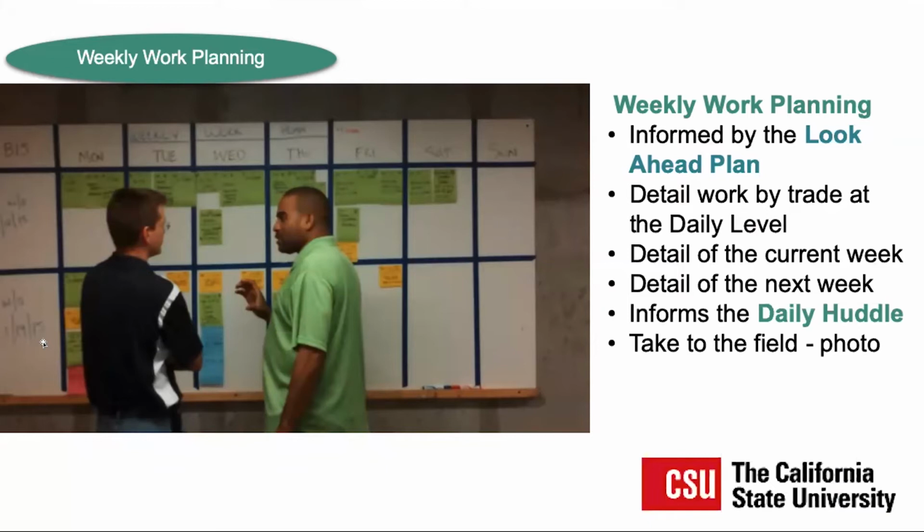Well, capture the metrics from the past week on your performance. How many commitments did you meet? And what commitments did you miss, and the reasons why? Not getting into a lot of detail on the why in an accusatory sense, but really just trying to capture data so you can look for trends. Then, what's our plan for next week? And really lock that down. That's how we're going to measure the reliability and predictability of our plan.